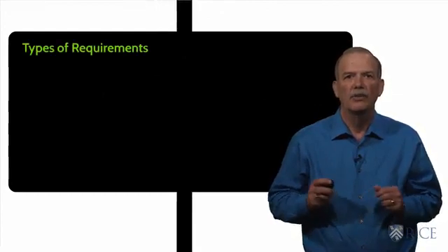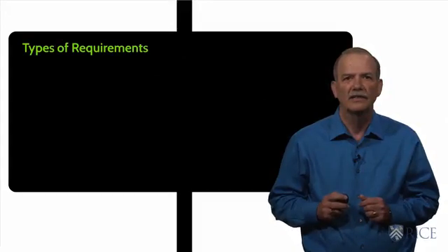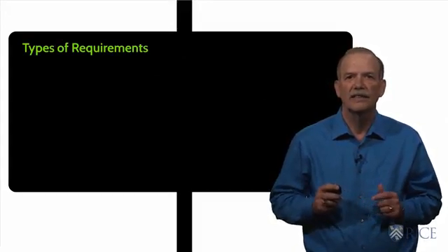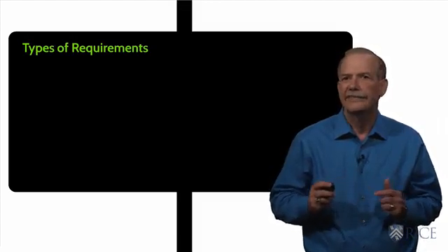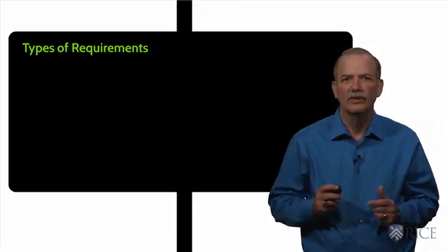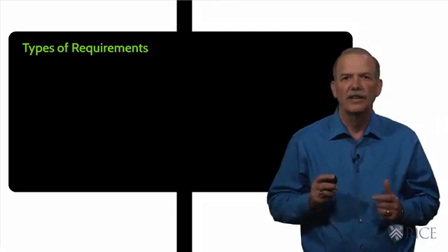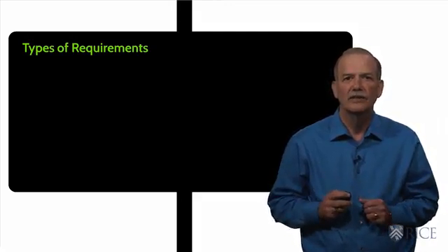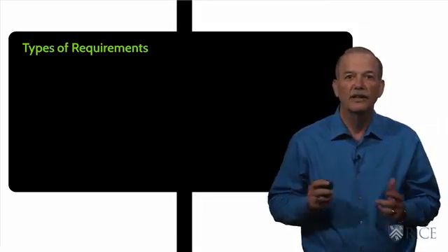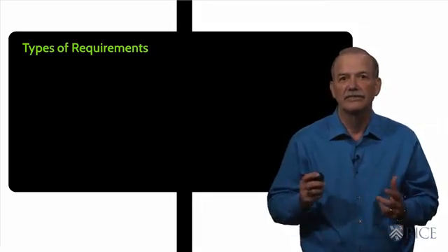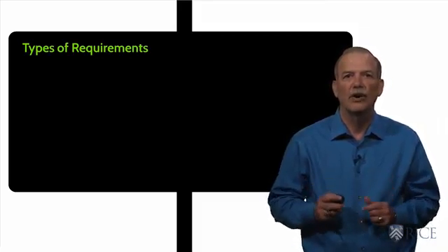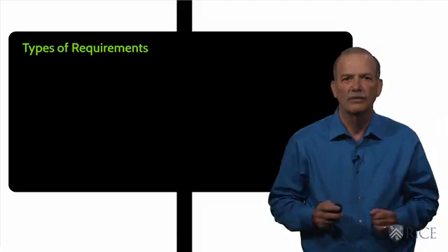It is important that we keep track of the source of each one of these requirements that we collect. It's not unusual that as we go through this process of collecting requirements, we collect conflicting requirements from different sources. Different stakeholders will hold different views on what the project is trying to accomplish. Other sources may conflict with the stakeholder and each other. The key in this first step is to document all the sources and all potential requirements.